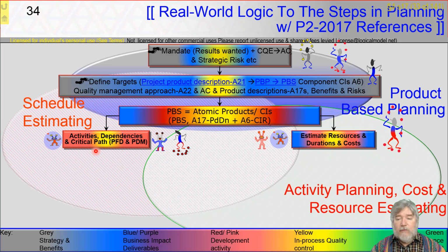In other environments we might not use those tools. We might instead use something like a Kanban board and use a pull-based mechanism which says we'll schedule things from when the last step has capacity. The step before says, hey, I've got capacity now, and says that to the step before it, and so on until we get to the start step. And the very first step can now start doing a fresh piece of work which will run down through the set of steps as things go.